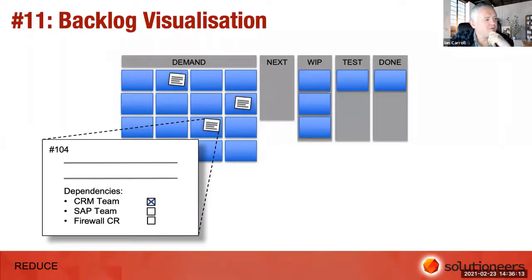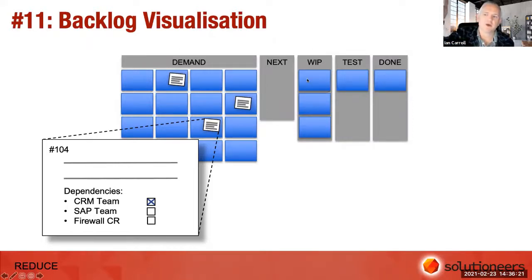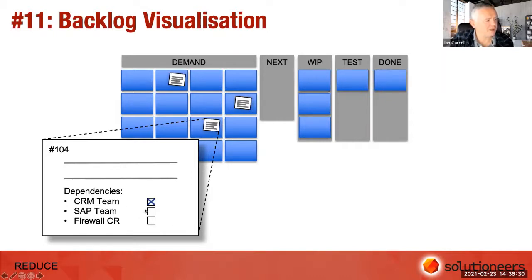Number eleven: backlog visualisation. Quite often teams pull work in, start working on it, and then discover a dependency. With a bit of hindsight, they should have known about that earlier. Using icons or checkboxes on cards in the backlog to show what dependencies need to be resolved before you pull that work into your pipeline — before you start working on it.